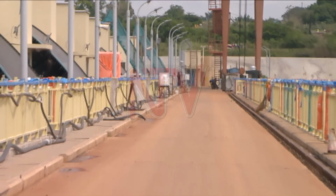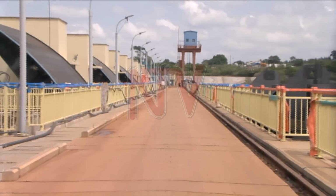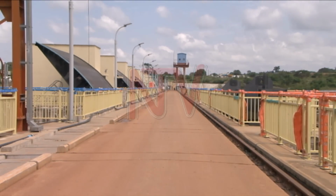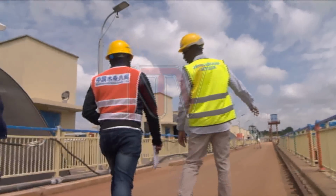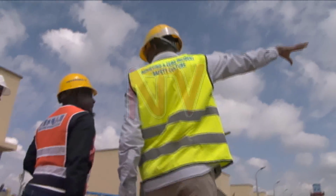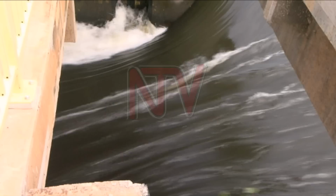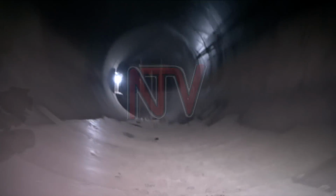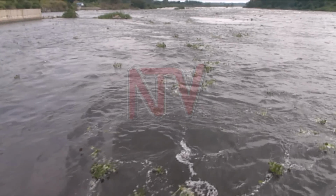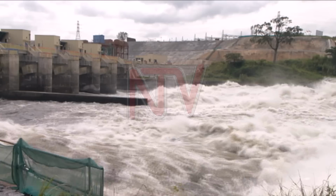Specifically, because the last 4 years have been strenuous over the discussions to fix major defects that beset the troubled 2 trillion power project from the early days of construction. On September 29th, engineers commenced the process for wet commissioning for the first turbine, filling its chambers with water, which process ran until October 16th. To their frustration, they discovered glitches at the tail race outflow tunnel, or TRT gate, the outlet for water from the turbine chamber.